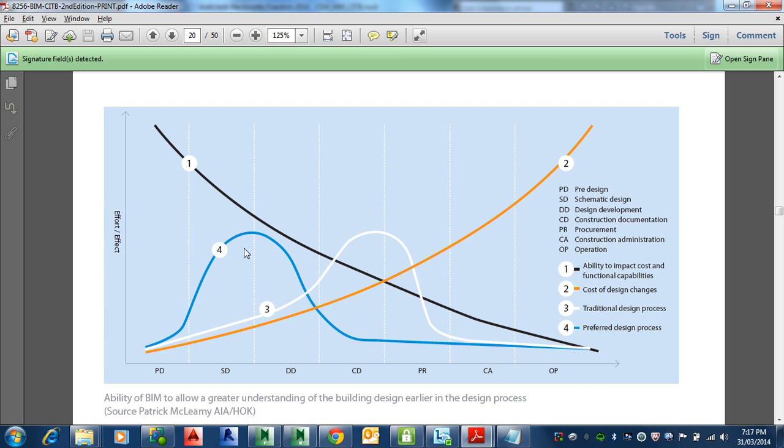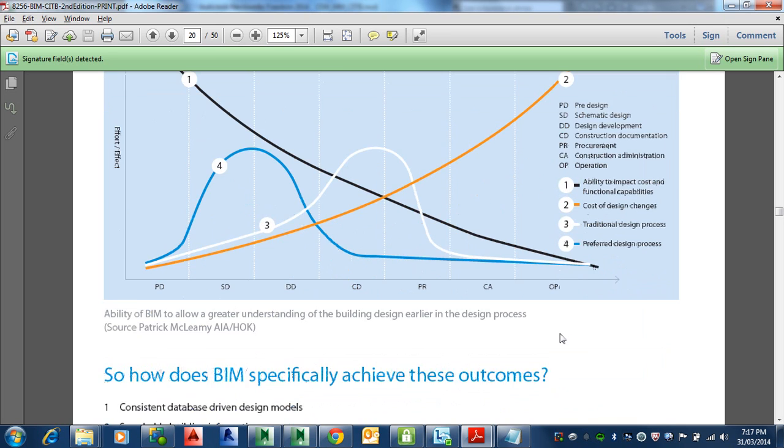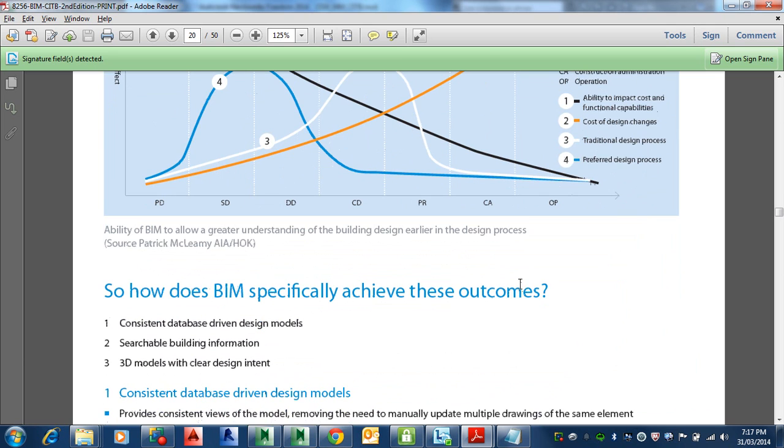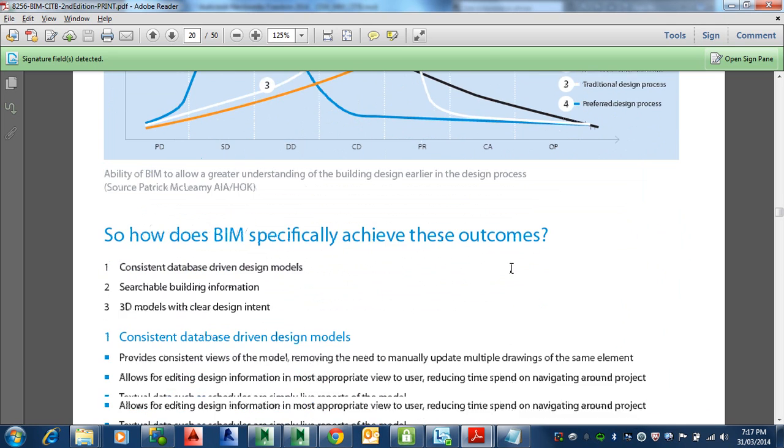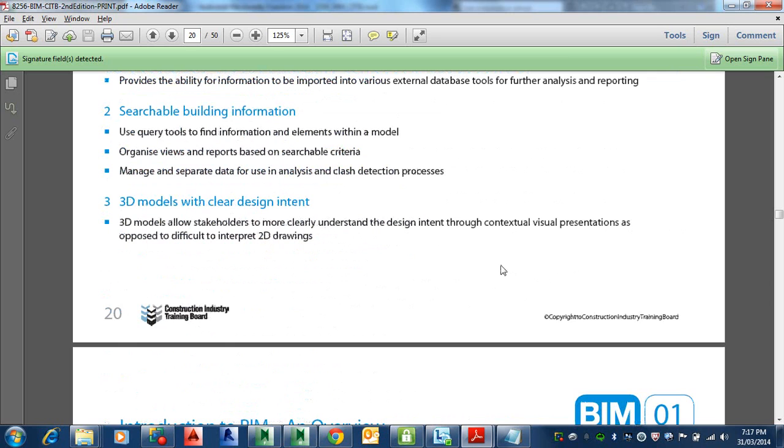Once you put all the information in during design development and sketch design, you've got it right, and these construction documents are just basically printed out. Presumably at this level you have discussed all the issues and done a lot of your clash detections, so you avoid all those changes later on, where they cost money. Once you start building around here, then you're in trouble. You don't have much ability to make changes.